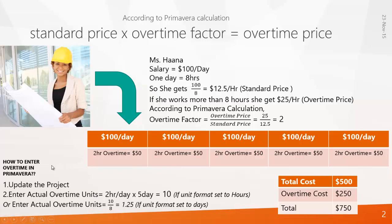So when you enter these values in Primavera, the first thing you have to do is update the project, then enter actual overtime units. Actual overtime units = two hours per day multiplied by the number of days she worked overtime — that is five days — making ten. If the unit format is set to hours, you enter ten. If the unit format is set to days, you divide ten by eight, giving 1.25 as actual overtime units.